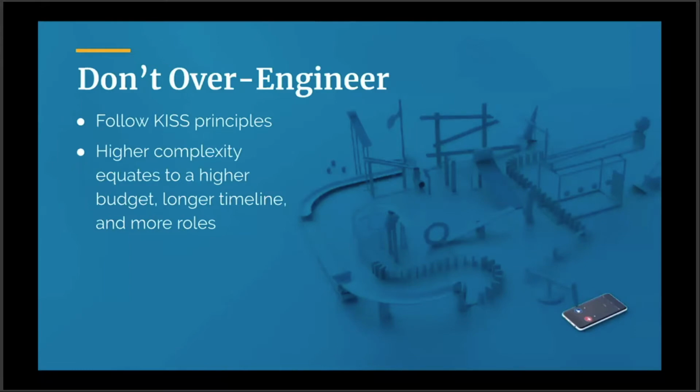One thing to keep in mind as you're going through the process of gathering requirements and writing epics is don't fall into the over-engineering trap. Keep it simple. You'll want to start thinking about the roles and the skills that are needed for the project. At a minimum, you'll need a UX designer, front-end developer, back-end developer, a QA analyst, and a project manager. And these roles are all included by default in the Agile budgeting kit.